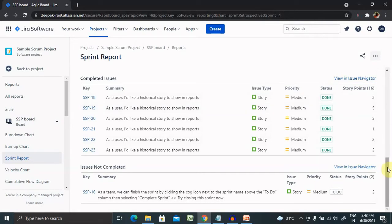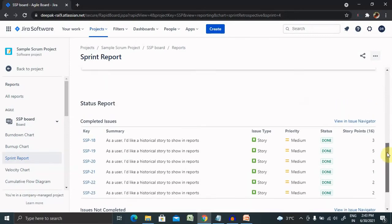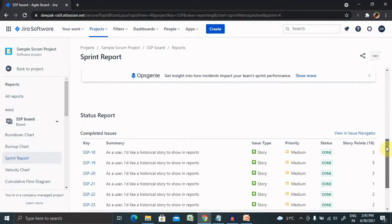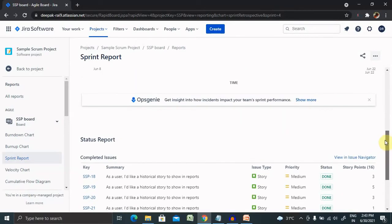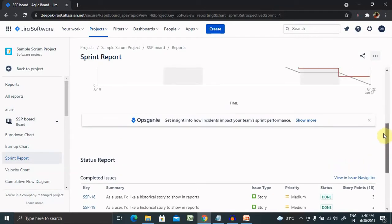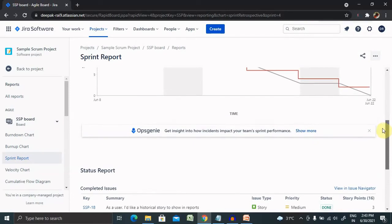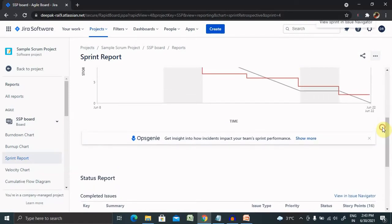Let's understand how we can view the sprint report. The sprint report is board specific, that is it will only include issues that match the board's saved filter.